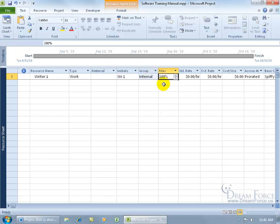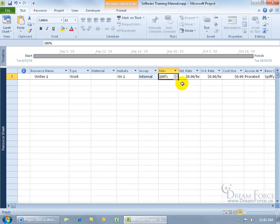Let me go ahead and hit the tab key. The maximum units is the percentage or hours of work a resource can do when assigned to a task. So if they're at 100%, my default working hours a day are eight hours, then that means that WR1 can work at full hours or eight hours a day.